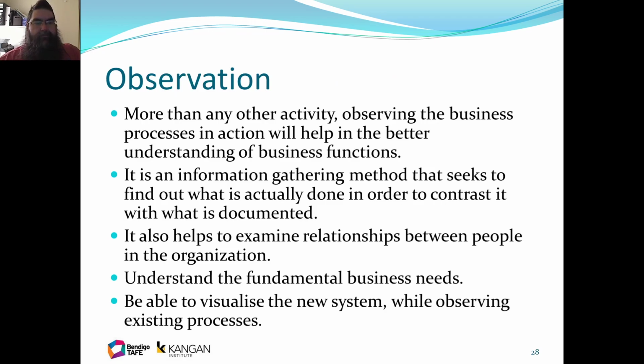The most successful one is observation, where you will come in and observe what the business process is while on a normal daily transaction. So this is to actually find out what the people that are doing the job actually are doing, rather than what the paperwork of the process says what should be done, because quite often those two things do not align.